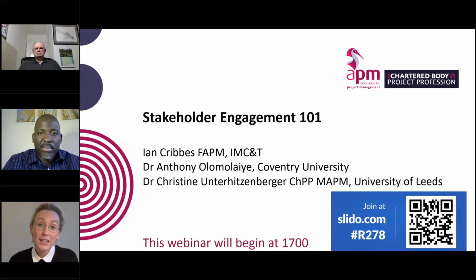For example, if you identify that this stakeholder also has personal opposition against you and therefore doesn't really trust what you're saying or questions what you're saying, then it might be more useful that another stakeholder talks to them. So that is one of the strategies which you can employ.